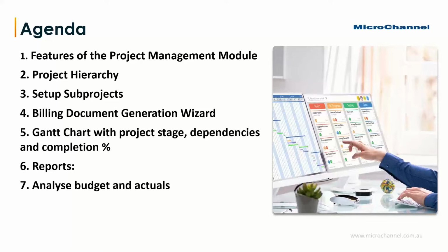A project can also have multiple sub-projects, and within those sub-projects, you can have further sub-projects, so you can have multiple levels, and each one of those sub-projects can have their own costs, and you can view the overall financials or the financials for the individual sub-project.